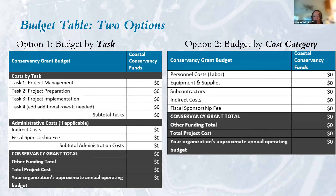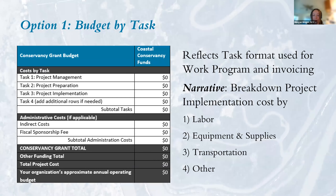Two budget submission formats are offered: by task and by cost category. The task format uses three tasks — project management, project preparation, and project implementation — and reflects the format used for invoicing once a grant is approved. In the narrative, break down implementation costs by labor, equipment, supplies, transportation, and other. The cost category format is more intuitive, allocating costs by type of expense such as personnel, equipment, and subcontractors. You'll eventually need to use the task format, and staff can provide technical assistance.